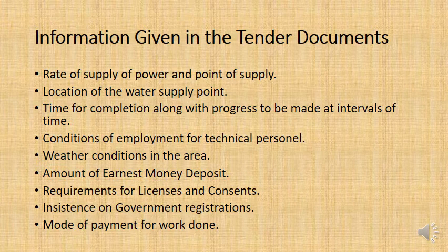But also there could be phases of the construction or the design that need to be completed before then. You need to have completed all of the design work for review before 19th of July. And you need to have completed the foundation excavation before September the 1st, and so forth and so forth. You can put conditions in place like that. You can also put conditions of employment for technical personnel.